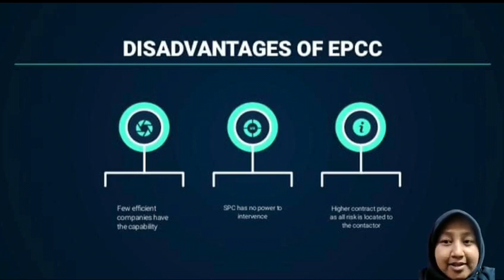Finally, the contract price is higher. This is because all risks are allocated to the contractor and the result is a higher overall project capital cost.